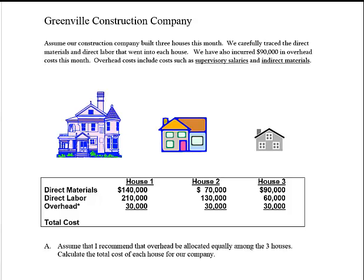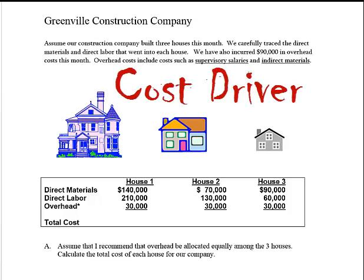In Part B, I asked the class to come up with a more fair way to allocate overhead, once they agree it doesn't seem fair to allocate it equally given the houses are different sizes and complexities. One student proposal: maybe there's a relationship between how much direct materials and direct labor went into a house and how much supervising and indirect materials that house used. That's making an argument about what's called a cost driver — what drives the cost of supervision or indirect materials?